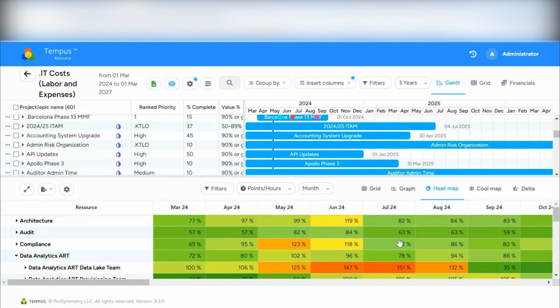Projects typically get decomposed into phases and then tasks. Agile epics typically get decomposed into epics and then stories, right? And so you want to be forecasting by team and role and refine your estimates as you go. But yes, they're very, very similar in that regard.